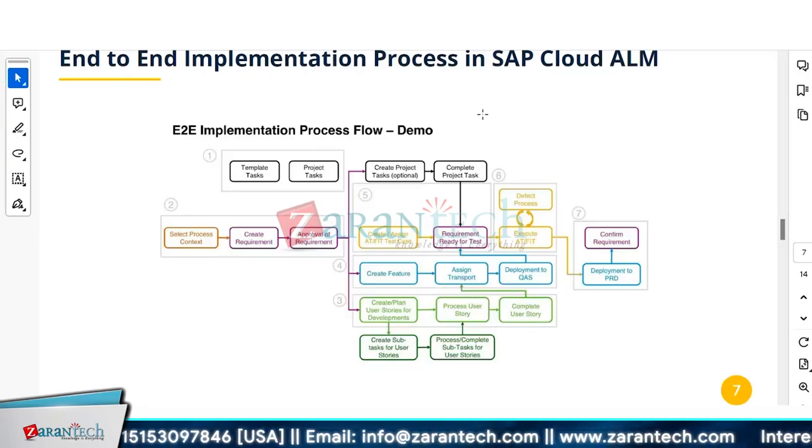Obviously, then you can map those defects back to a feature, right? And then again, the developer needs to work the whole cycle again. And so that's where defect is there. You can create defects directly from the test cases. If there's a failure, you can create a defect, and again you can work on the feature, and then again go to testing. So this whole complete cycle is there, right?